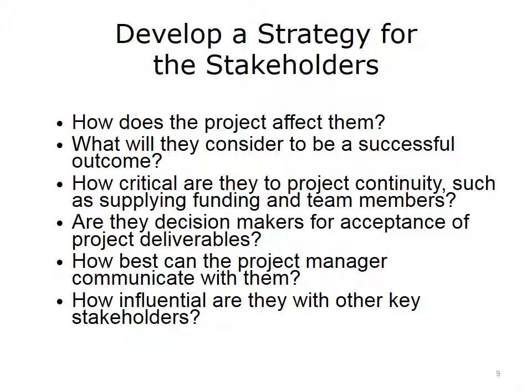There is no substitute for asking stakeholders directly, how do you want to be kept informed of progress on the project? It can be annoying if there is excessive communication, especially if it is not the way the stakeholder wants to communicate with you. The frequency, timing, nature, and method used for communication with the stakeholder can be critical in establishing a good rapport and building trust. There can be cases where some stakeholders want a lot of visibility into the project, with a lot of reports and a lot of communications, and other times when they are content to get periodic updates.